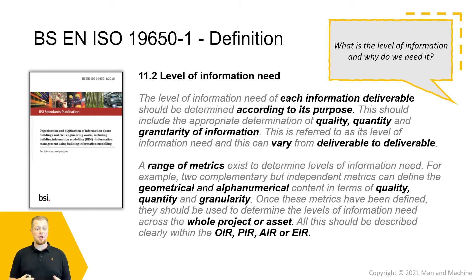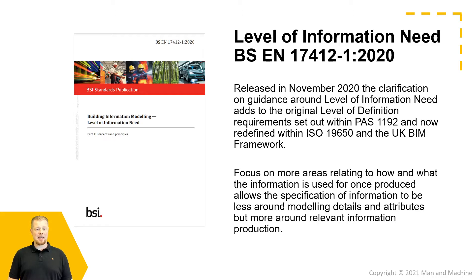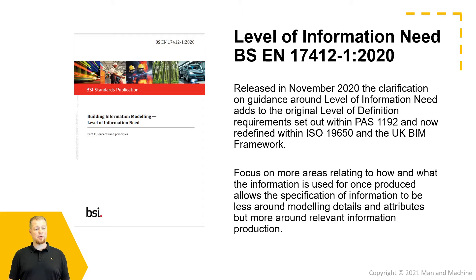Normally during inception we can provide information in anything from the organisational information requirements through to the asset information requirements and directly into the project. BS EN 17412-1 was released in November 2020 and now covers clearly defined requirements setting out the needs of the Level of Information Need deliverables, broken down into key factors that need to be considered as part of this information requirement deliverable.